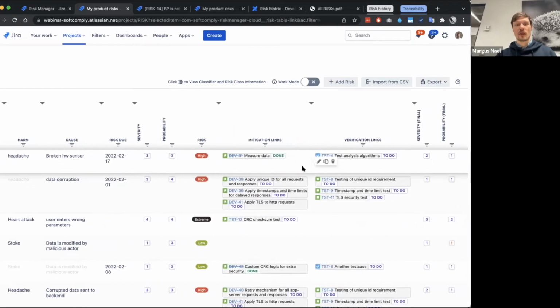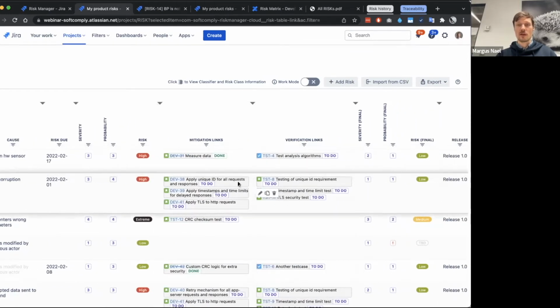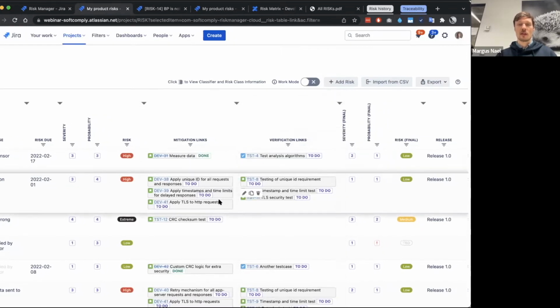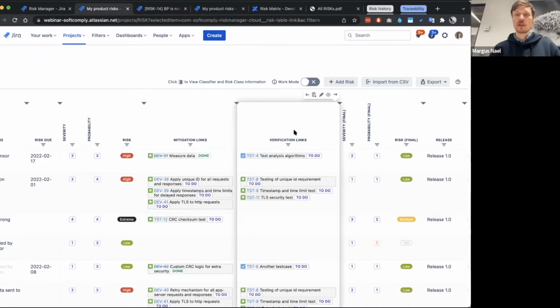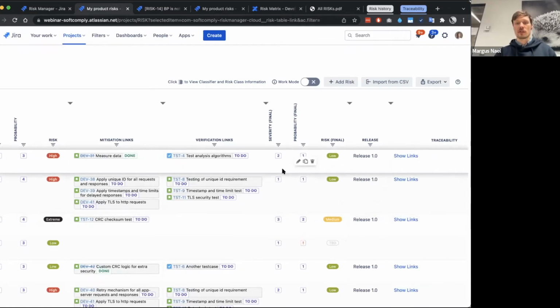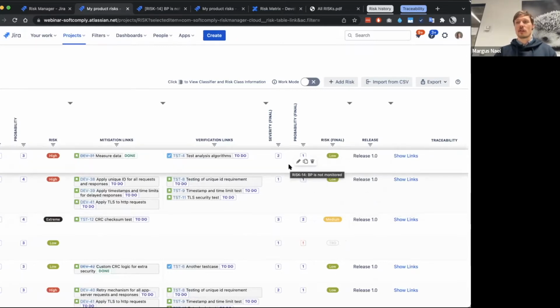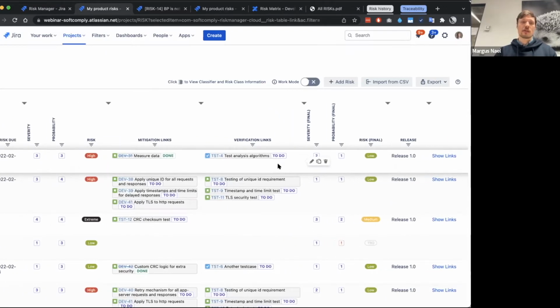And after we have done the first risk assessment, we'll have the mitigation and verification section, where we can start working with risks. Then also after we've mitigated and verified it, then we can just do the final risk assessment, and then it's basically done. So in theory, it's all pretty simple. Just write everything down, describe the risk, assess it, mitigate, test the mitigation actions, and do the final assessment.